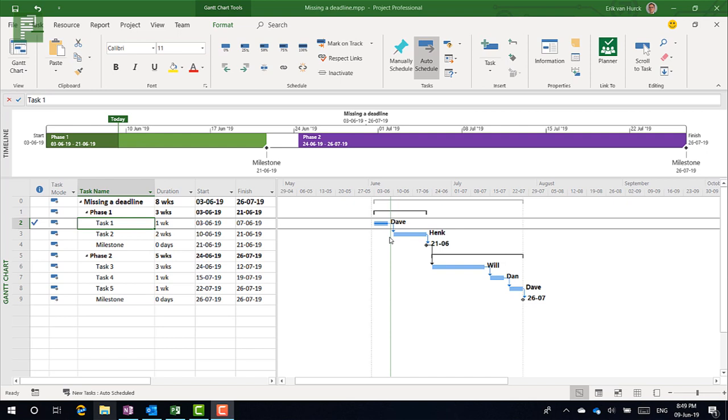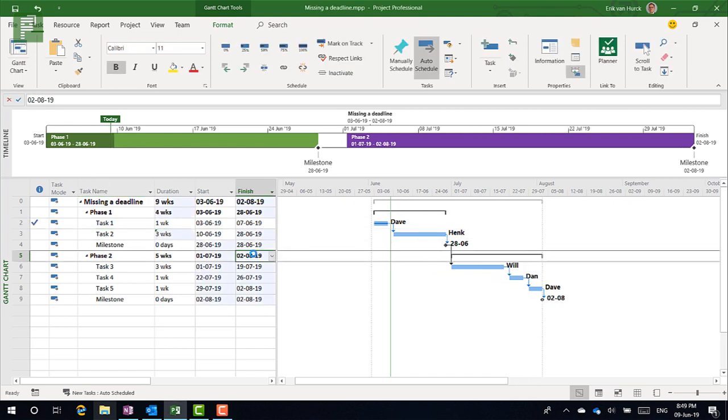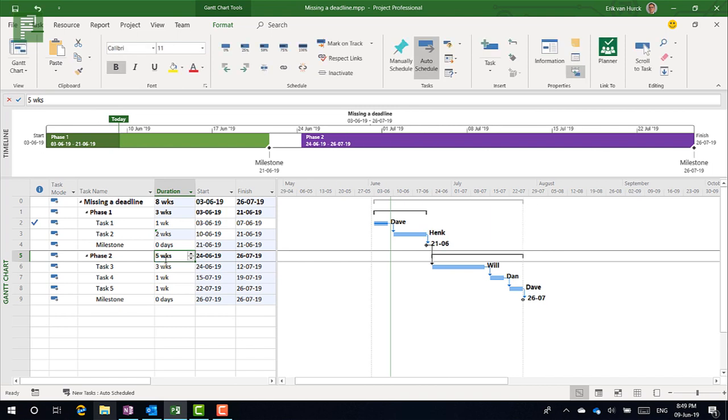Currently there's tasks, summary tasks, milestones, and they're interdependent on each other. So if I move this task to be three weeks instead of two, everything pushes to the back. And I can change that back - change highlighting shows me that there's changes in the actual finish date of that schedule. But these are dynamic elements within the schedule.